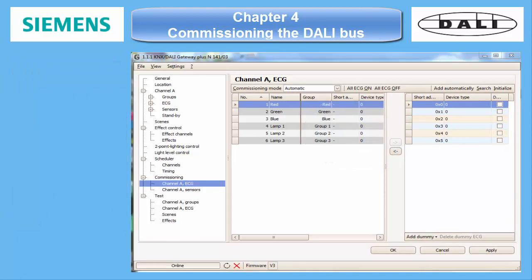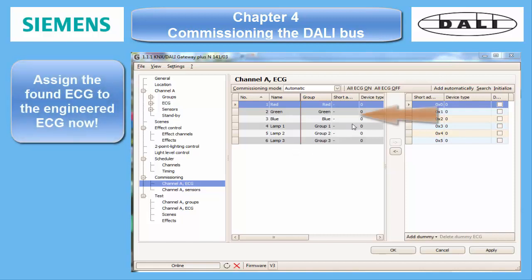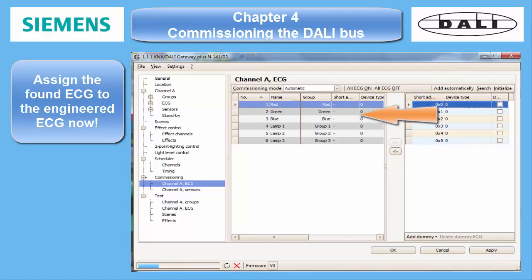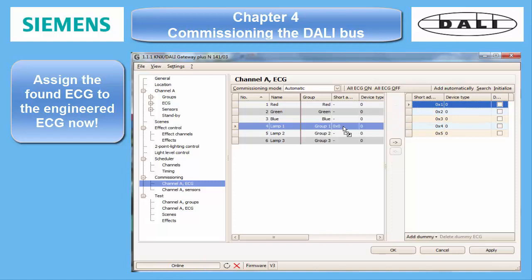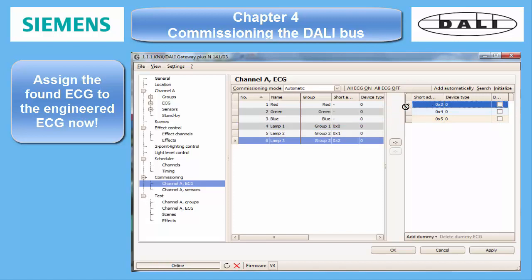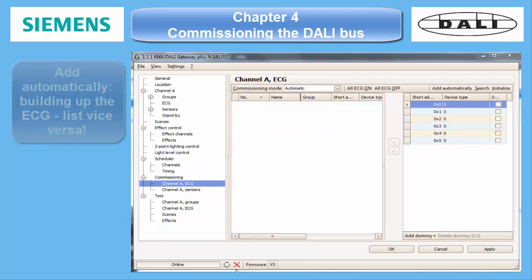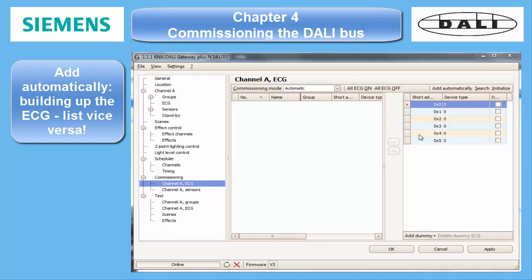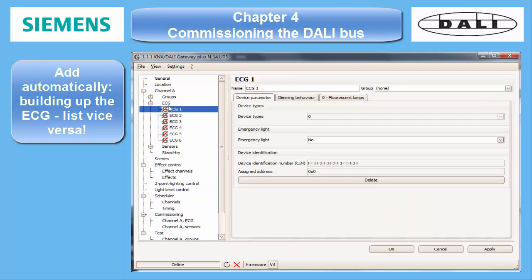Now the found ECGs must be assigned to the engineered ECGs on the left. For this, the lamps must be powered, because the usual way of commissioning is to allocate the ECG by flashing their lamps. You mark one on the right column, look which lamp is flashing, and drag it over to the matching ECG. In automatic mode, the flashing ends with choosing the next ECG from the found list. The option 'add automatically' means you can work the other way round — you have no predefined ECGs, but create them at this moment. Then you have to go back to the channel's ECG list to assign them to the groups.